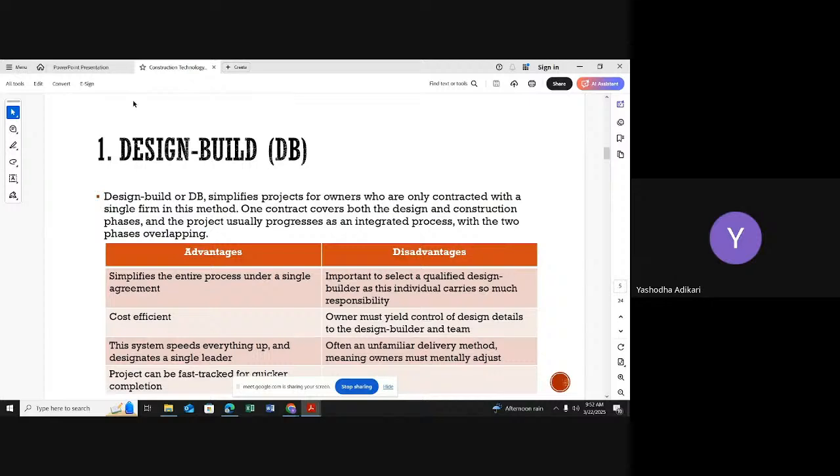Right? Now they have started the design part. They have completed the foundation and other things. Still, they have started the finishing design work. With the support of the structural design and the structural plan, definitely I can start my construction activity. It is not required to wait until the design is finalized 100% with all the requirements.